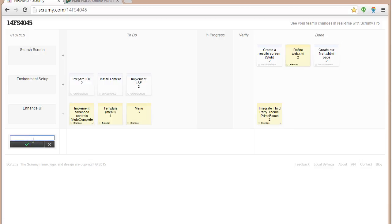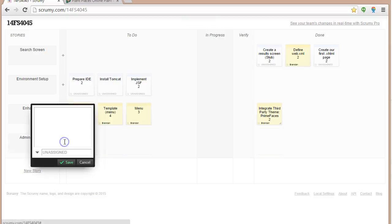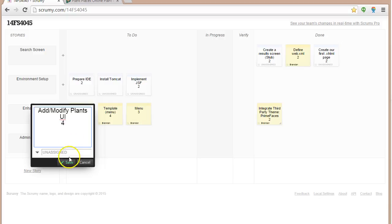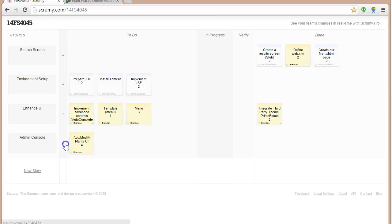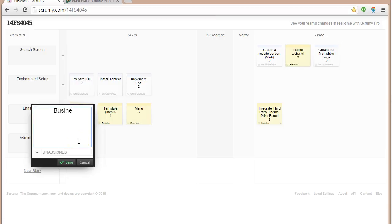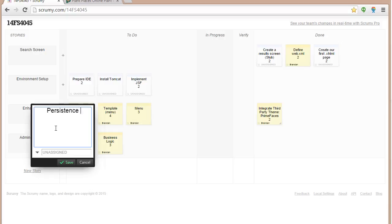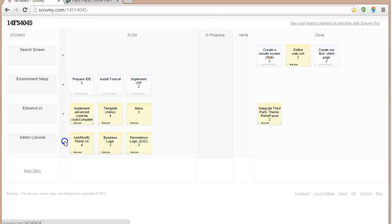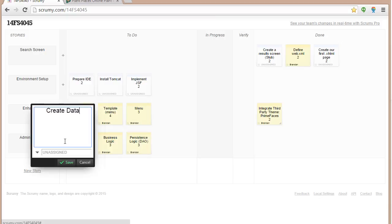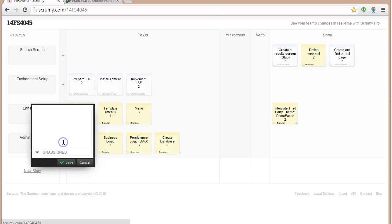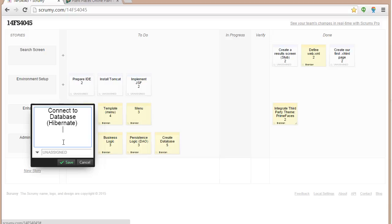After that, we're going to want some kind of admin console where we can add plants. So let's say an add modifier, just to maintain if you want, UI. That might take, gosh I don't know, maybe four hours, assign that to me. We're going to need some business logic for adding plants. We'll give that one, say, three hours and assign that to me. Let's say persistence logic. So we'll say DAO for that. DAO will say three hours and assign to me. Now we start to get tricky. Create database. Who knows? I'm going to say five hours and assign that to me. But that's not all. We also have to connect to the database, probably with something like Hibernate, which is object relational mapping. That's going to be maybe four hours and we'll assign that to me.